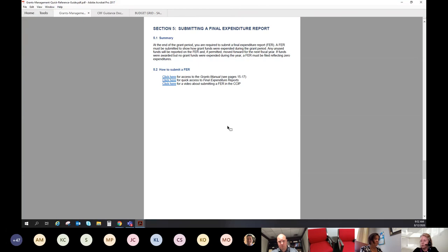With all that said, the final expenditure report will pay out a final project cash request. So if you get to December 30th and you say, I have been so busy with all this stuff, I forgot to submit my final project cash request, the final expenditure report will look at your total expenditures and the cash received. And if we owe you any money, the final expenditure report will pay out. So don't panic.